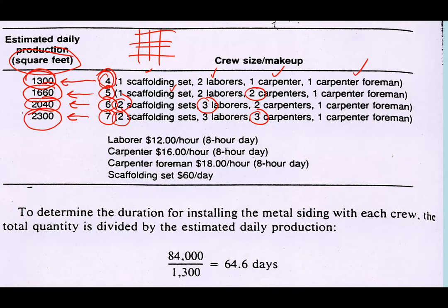That is the relationship: the more man, machine, material you put, for sure you will get a bigger output capacity of works. Based on these people and the scaffolding, we can calculate. This is based on unit rate. We already know unit rate on laborer, equipment, tools, scaffolding, whatever is available on the market, you simply can calculate. This is just an example.